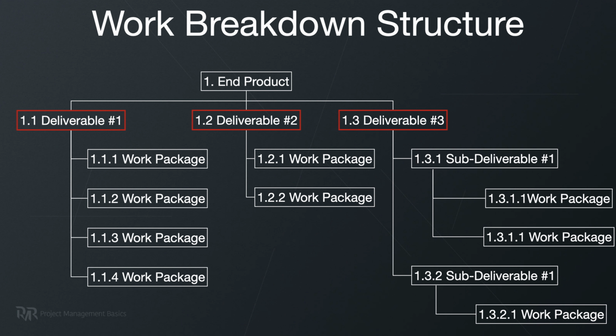You need to create a work breakdown structure and decompose the project into deliverables, work packages, and then into activities or tasks. And the key point here is that you continue to decompose the work until you get to the level where a task is clearly understood by the person who needs to do it, and one person can do it on his or her own. And only then you start to estimate the duration, the cost and required resources for each small task that you and people on your team understand.